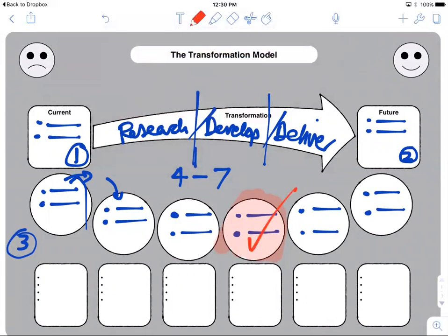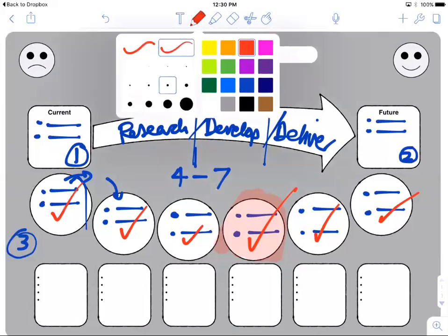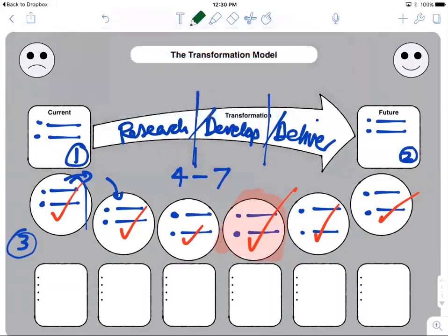well, if each of these milestones were successfully delivered, would we get the future outcome? And if the answer is no, then there is something missing at that level. And if the answer is yes, then we have effectively covered everything. Now, only at that point would we take those milestones and below each of them drop them into descriptive activities that are required to address that milestone. And each of these activities becomes a mini plan for each of those milestones, if you like.